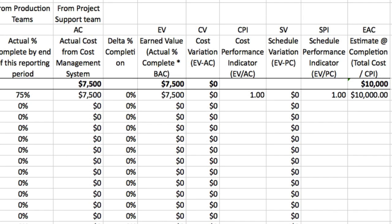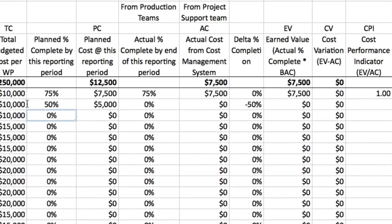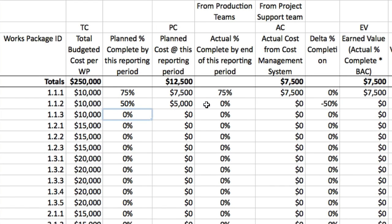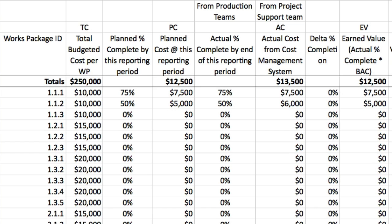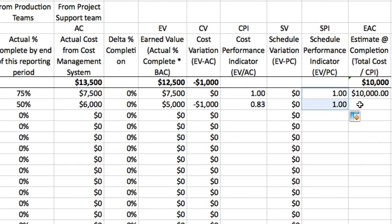Work package 1.1.2 should be 50% complete, and it is — the actual percent complete is 50%. However, we've spent more than budget to date: we've spent $6,000, but the budget is only $5,000. The CPI is at 0.83 and the estimate at completion is $12,000 — $2,000 above the baseline budget. We'd better keep an eye on that one.